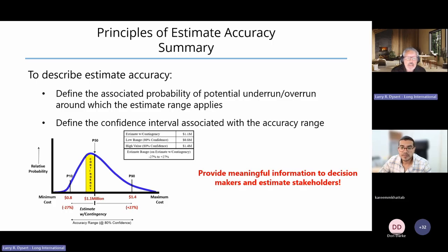Yes, so you mentioned that you're using a QRA process. That effective QRA process is always going to end up generating either a cumulative, or in this case, more of a histogram type of cost distribution. Once we have that cost distribution, then we can intelligently understand how much contingency we need to add to our point estimate to reach a given level of underrun versus overrun. There are potentially thousands of elements.